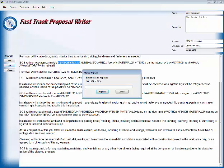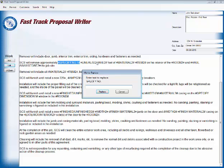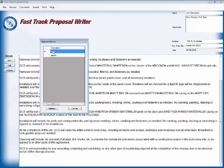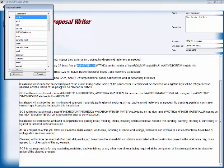Now this one here, the next line is we'll remove approximately specify number lineal square feet of material. And this is kind of a generic term. We're going to tear out the surrounding casing on the windows. And it will be, there are 503 windows. So that means we've got 16 lineal feet times two, which is 32 plus 10% waste. So we're now we're at 35. So specify, remove approximately 35, replace.